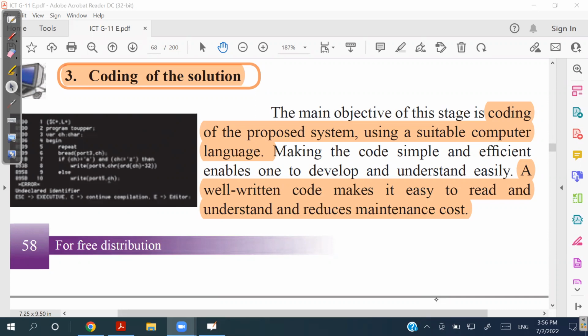Yes, Asrika. The client will test the system first. If he is satisfied, then only he will pay the balance. So when the project team starts the project, they will have a small advance, and most of the payment will be done when the acceptance test is done. The full payment will be completed after the deployment process has happened.